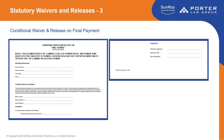There's an exception you can put down at the bottom for 'disputed claims for extras in the amount of blank.' You can release all your claims in exchange for that payment, but if you have some disputed issues, that's where you would put them. For example, you might write 'disputed change order in the amount of $6,532.' That means you release everything on the entire job as long as the check clears, in exchange for the check in that amount, but the listed disputed issue is not resolved — you can still do a mechanics lien, stop payment notice, or bond claim on that. Then you sign, date, and send.